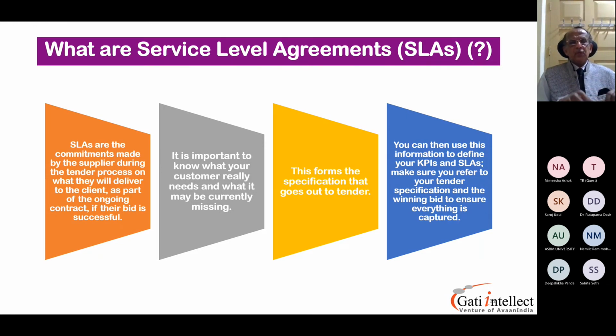So you should insist, and you should put in your RFP itself, boilerplate terms will not be accepted. Detailed costing has to be provided. That should be part and parcel of your RFP. So how do you start? It should initially be incorporated in the tender charter. I want you to understand the genesis of it. So the first point is it has to be incorporated in the tender charter under the precise topic.